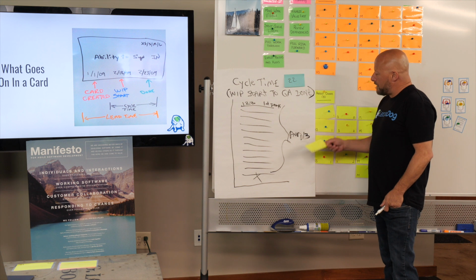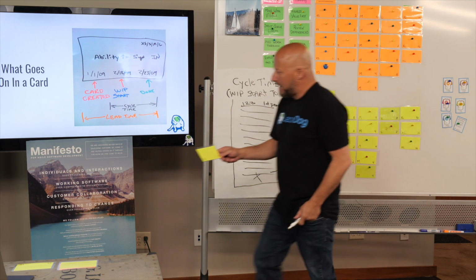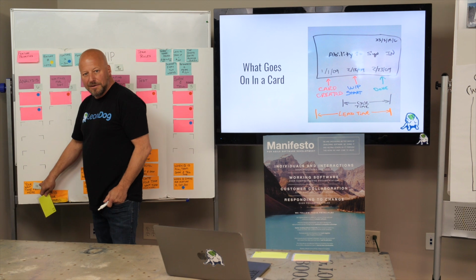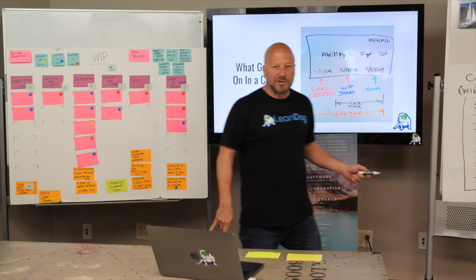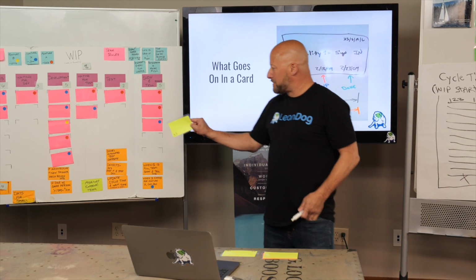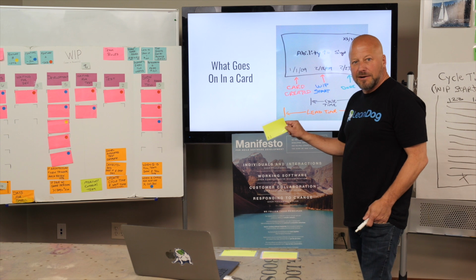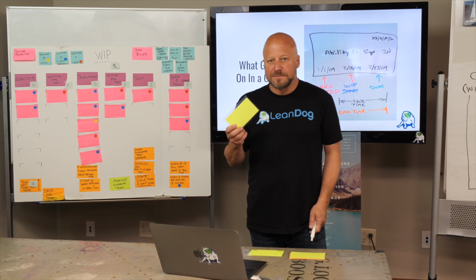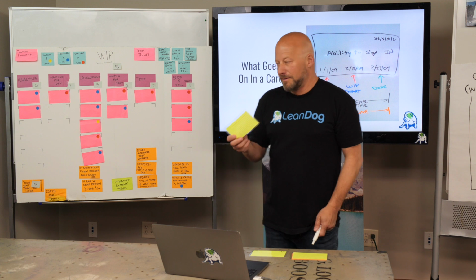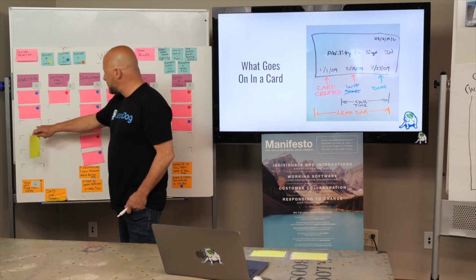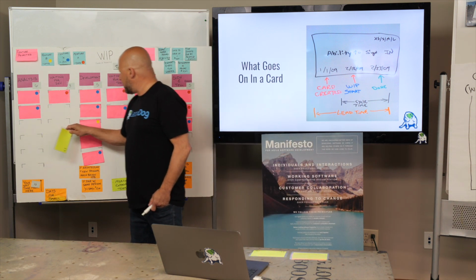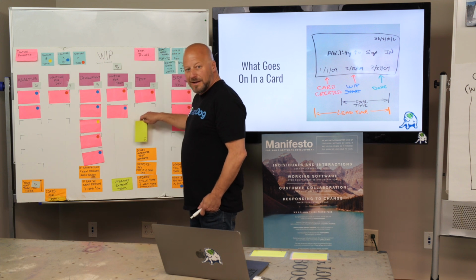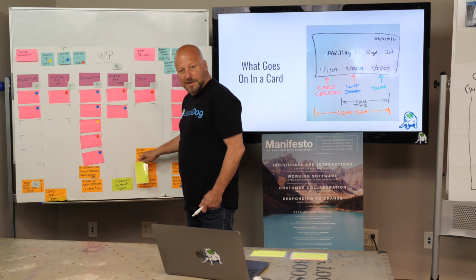And so now that I have a new cycle time, I can go back here and I can update this and say, wow, my wait time from here to done, to QA done, from the time it hits the WIP start, it took us 13 days to get there. So what did I just measure, right? Think about it. Right? I measured, it did analysis, then it sat and waited. Did development, then it sat and waited, right? And then it got tested, right? And it got to done for test.